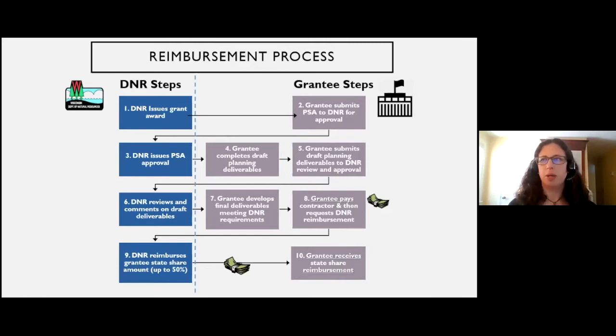So first, a progress report documenting progress for which the reimbursement is requested is required with the RFR. The progress report must explain what work has been done on what deliverables. Second, only 50% of the amount eligible for reimbursement can be reimbursed for partial reimbursement. So if the cost share rate is 50%, then only 25% of the amount spent is what can be reimbursed